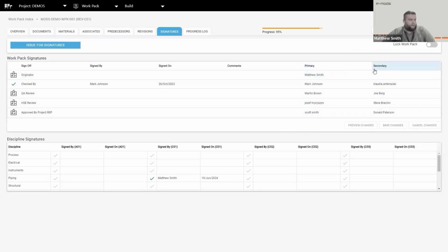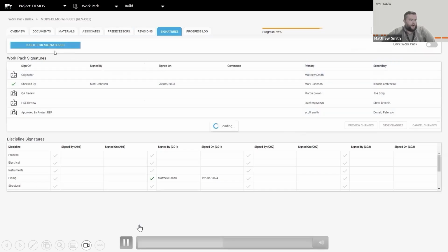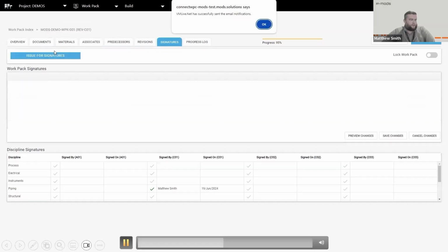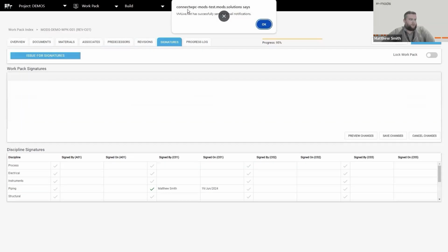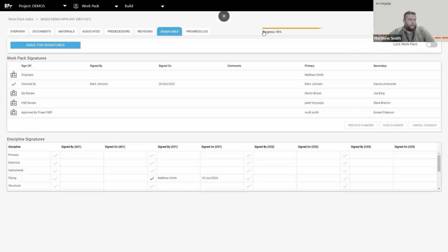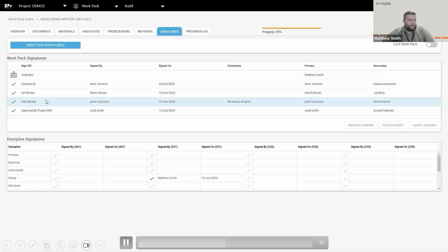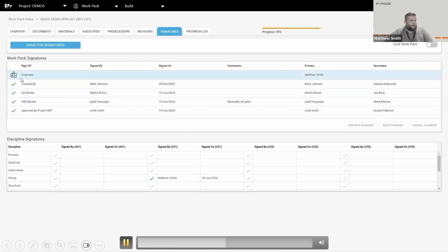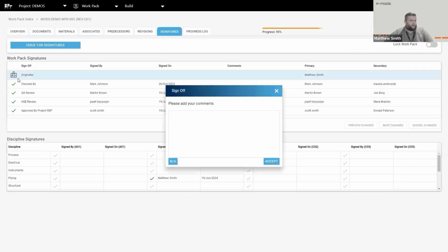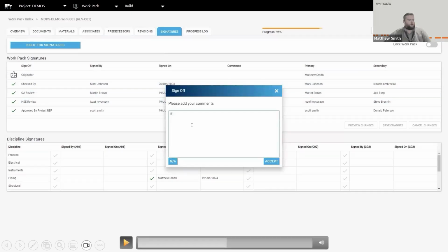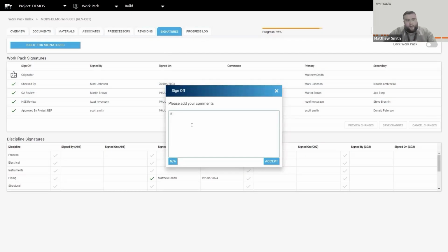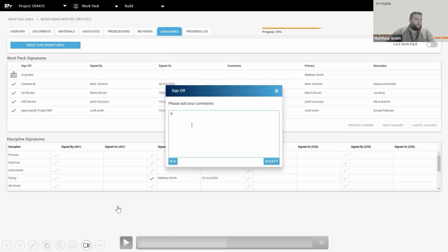And as we can see, when we actually come to the sign off of the WorkPack, we can assign users so that they are the responsible signatories. And they will get another action against their user account, and they'll be able to come in and sign the WorkPack here. Now, what's going to happen when I sign the final signature, as you'll notice, there is no order that you have to sign in. We feel like that is a bottleneck, waiting for other people to participate when you've already done your review.